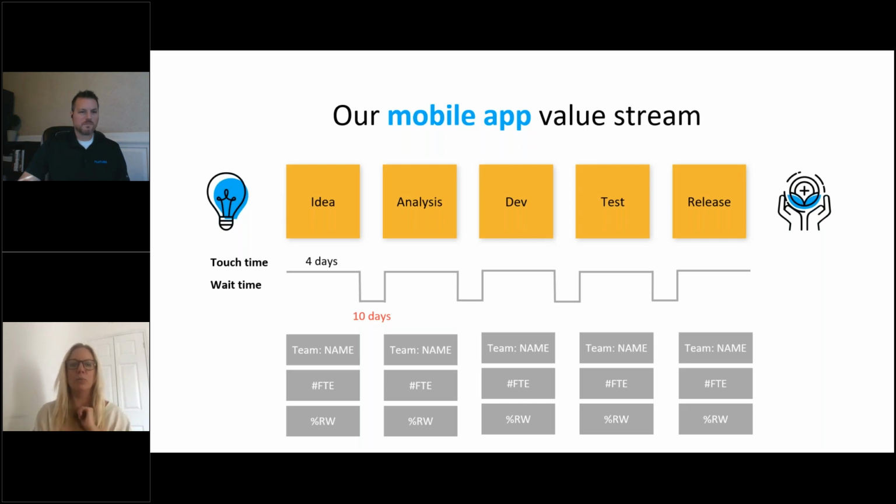And then that final number we've got there is the percentage of rework. So what we're then saying is, when they push that work downstream to analysis, how much of that work then comes back and they have to change it. And there's what we call a mirror metric for that, which is percentage complete and accurate. So if something is 80% complete and accurate, it is 20% reworked.